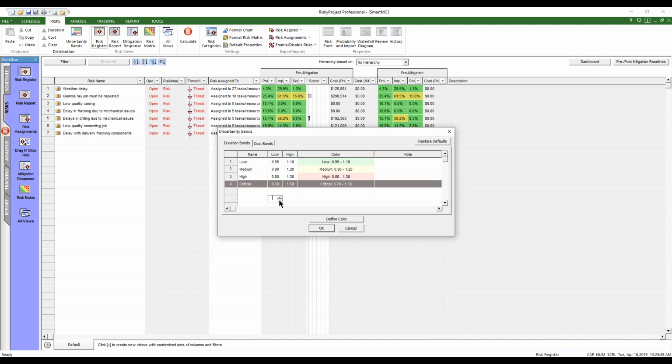If you look over the past performance of projects and what's happened, there are some calculators and processes that look at past performance or different types of factors within an organization: maturity models, what sort of technology is being used, training, all these sorts of things. They develop coefficients or bands that are used to calculate the level of uncertainty based on this information that you have.